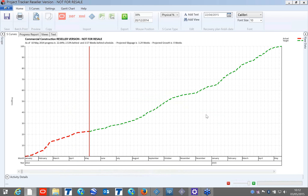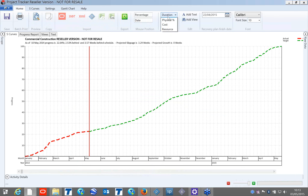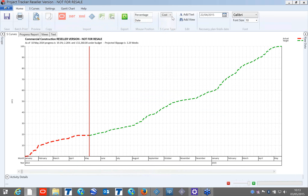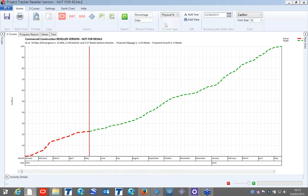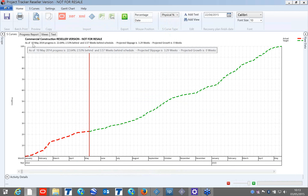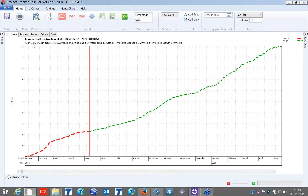On the first page, the home tab, after importing I have options to display the curve based on duration, physical percentage, cost, or resource. Now when I look at physical percentage, at the top it is quickly telling me that the progress is 22% and the project is behind schedule — giving me a quick summary of what is happening.